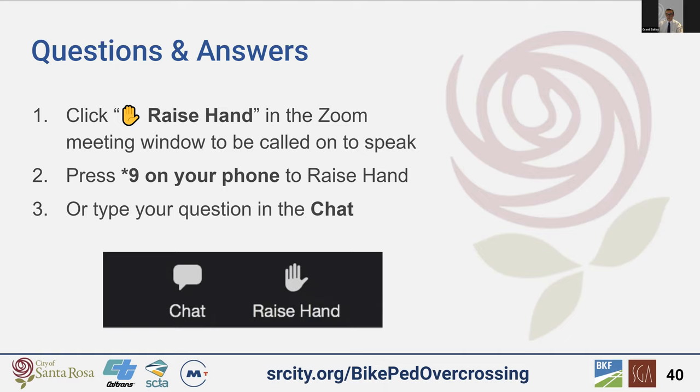I'll speak to that. The city has master agreements in place with the different utilities, and these agreements identify the shared cost. So to answer your question, yes, the cost is shared for utility relocation in most instances. As far as the specifics of what the cost sharing looks like, I might be able to provide an answer, but I don't know if it'll be accurate.